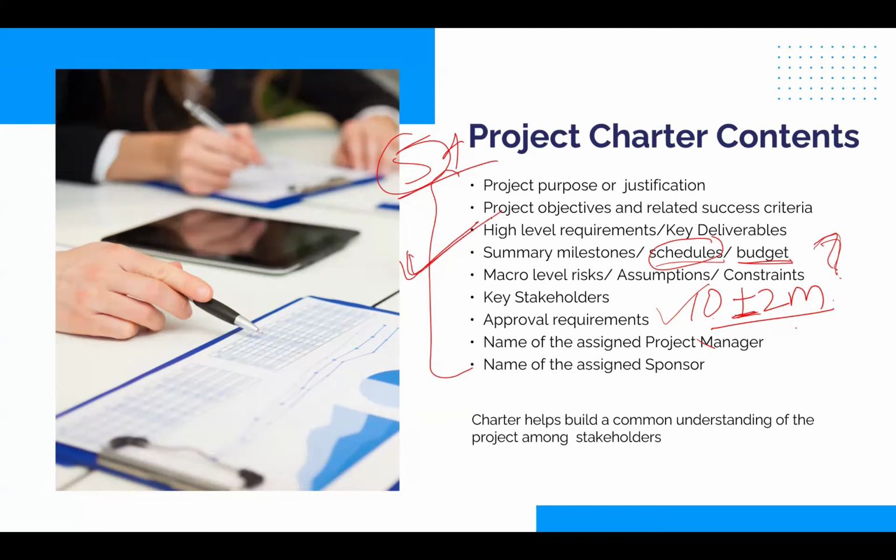And if the charter were to be updated, remember, PM can update, again requires approval of the sponsor. All right, if it were to be updated. That's right. I hope I answered this question. Next question, change request. Somebody asked, what is that? Change request required. Yeah, it is an answer to his question that if something needs to be changed. Obviously, yes. It's a document under change control. It requires formal approval to update the charter. That's correct.